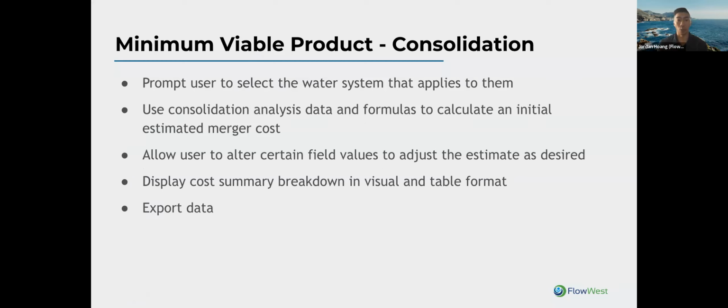And then for this project, we worked with the Water Foundation and the water boards to identify those features that could make up the MVP, the minimum viable product. We tried to identify what the scope was, what features would help to begin to solve that problem, and what we could develop initially, just so we could get it out to the water systems and TA providers to gather feedback on what's helpful, what isn't, what's still needed. So that's maybe some of the points that we'll be able to get today. This slide and the next one are going to talk about those features.